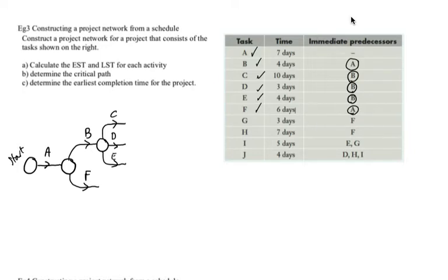Our next task is to find the next immediate predecessors. We see this one uses F, so let's do that one. And out of that will come G and H. Tick, tick. Now activity I uses E and G. So let's have a look at that. Well, we can see that E and G are indeed right next to each other, just here. So we don't have to do any flipping.